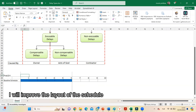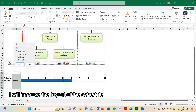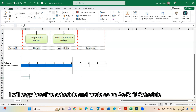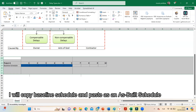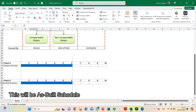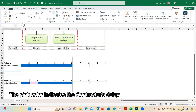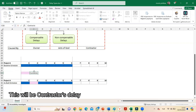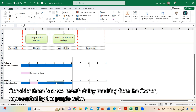Consider the baseline schedule finishes at the end of month 6. I will improve the layout of the schedule, then copy the baseline schedule and paste it as the as-built schedule. The pink color indicates the contractor's delay.